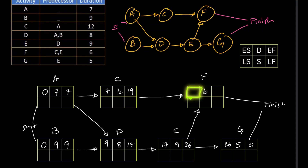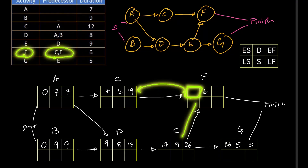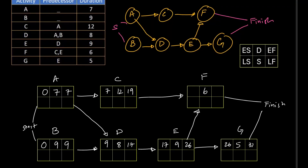The ES box of F has two options: 19 from C or 26 from E. Since F starts after the completion of both C and E, the highest number is written in the ES box of F. 26 is the highest, and 26 plus 6 equals 32. We have successfully completed the upper box — the forward pass.